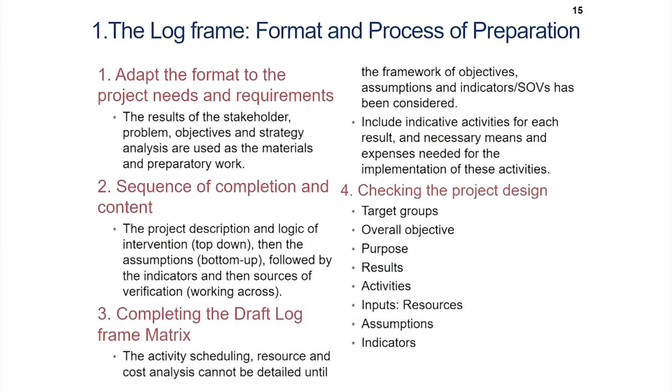And when we are thinking in terms of measurable outcomes, we obviously will have a certain set of assumptions as well. So, let us again first look at what are the components of the logical framework matrix or the log frame matrix. There are formats and processes of preparation. So, one is we adapt the format to the project needs and requirements. The results of the stakeholder problem, objectives and strategy analysis are used as materials and preparatory work. So, all that we did in the analysis stage can be used as preparatory work.